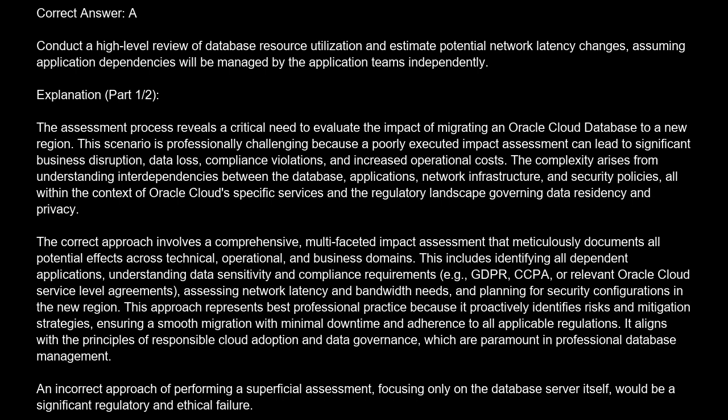The correct approach involves a comprehensive, multifaceted impact assessment that meticulously documents all potential effects across technical, operational, and business domains. This includes identifying all dependent applications, understanding data sensitivity and compliance requirements, e.g., GDPR, CCPA, or relevant Oracle Cloud service level agreements, assessing network latency and bandwidth needs, and planning for security configurations in the new region.